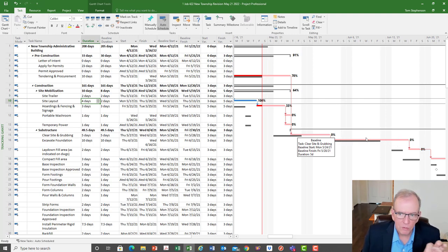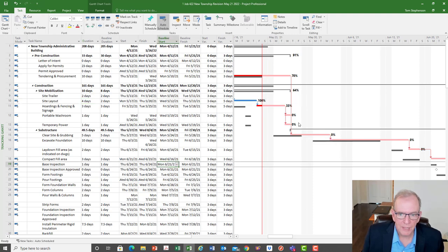The I is look more immediately than later. Because if you take stuff out of the end of the project, when you get to the end of the project, it's got no flexibility. So better to fix it sooner rather than later. Look for the no or low cost solution, and experiment. Looking for the no or low cost solution means reduce cost. Maybe there's opportunities even to do it for less money now that you're in the thick of the project. So you want to reduce and you want to experiment. That's what we're into right now, experimenting and seeing what we can do.